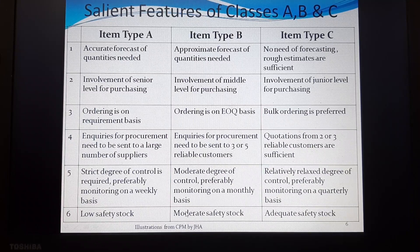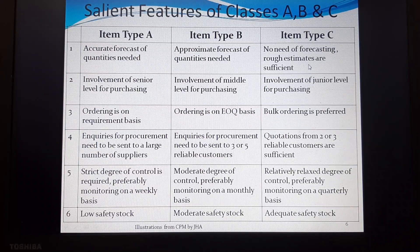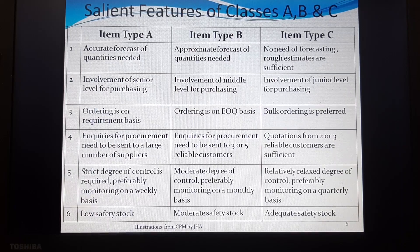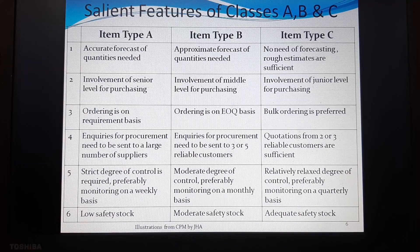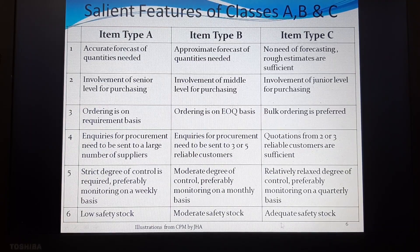For Class C items, which have the least value, no detailed forecasting is needed — a rough estimate is sufficient. Involvement of a junior level purchasing committee is acceptable. Bulk ordering is preferred and quotations from two to three reliable suppliers are sufficient. A relatively relaxed degree of control is used, with monitoring on a quarterly basis, and adequate stock can be maintained.